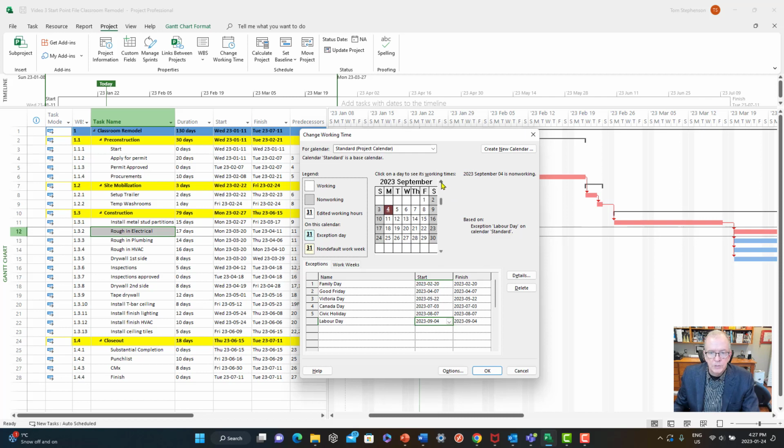Construction projects usually run several years, so that's the other thing. Like I said, I usually populate a schedule that goes for like 10 years, and then I've got it already with all the holidays for 10 years, and then I don't have to keep doing this. But there are certain things that you always have to be careful about, even if you've got a template. Like, for example, if I go to the Christmas time period for 2023, the question is, do you not work Christmas and Boxing Day, or like many construction companies, do you take that whole week off, maybe not coming back till January 2nd, right?